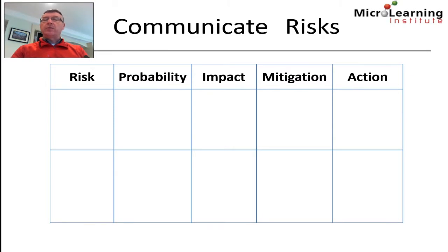Now, this risk register is a source of knowledge management within the organization because, of course, if one project develops a risk register, when a similar project is being delivered subsequently, the project manager for the subsequent project can leverage the knowledge that was collected in the initial risk register to ensure that the organization isn't continuously exposed to the same risks.